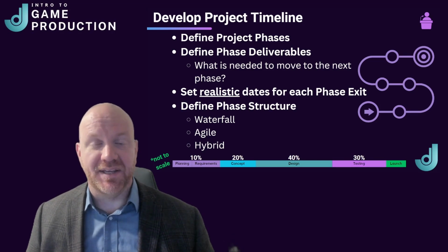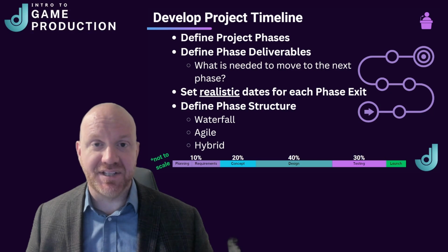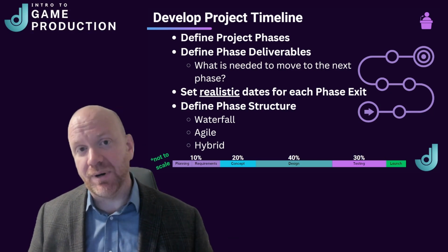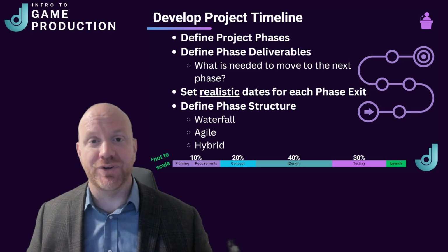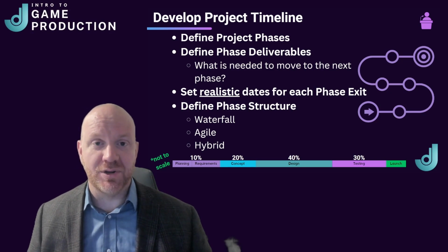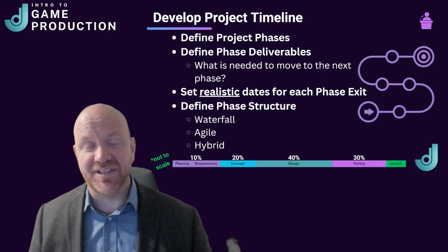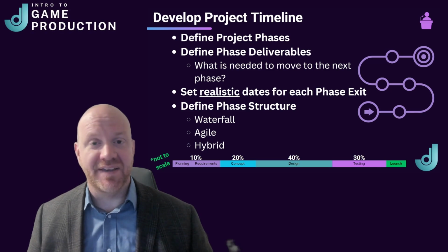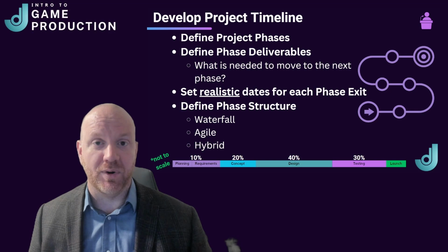One thing that I think a lot of teams neglect is to give themselves enough time for testing the game, to debug all the things that aren't working and make sure that everything is working together. So in a 10-month project, the testing phase should take about 3 months, and this gives ample time to ensure that the game meets those quality requirements.